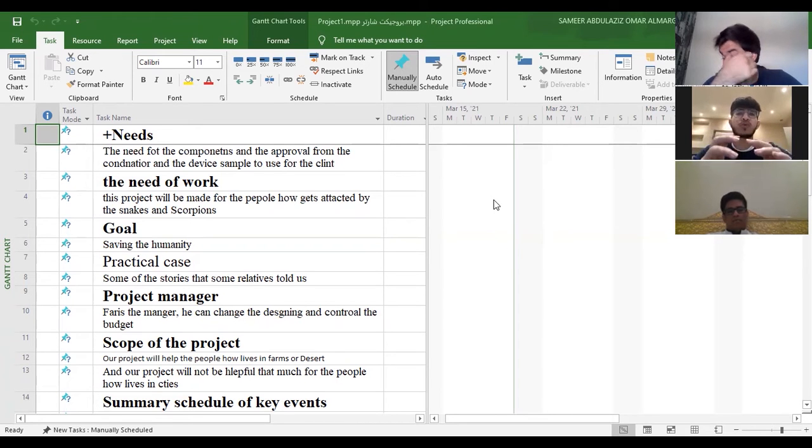Any project you want to do, you must have the project charter. The inputs for the project charter are the business case document, the business case and benefit management plan, the agreement, and the factors surrounding the project. And if you want to get the project charter or assumption log, you need to do many things about this.